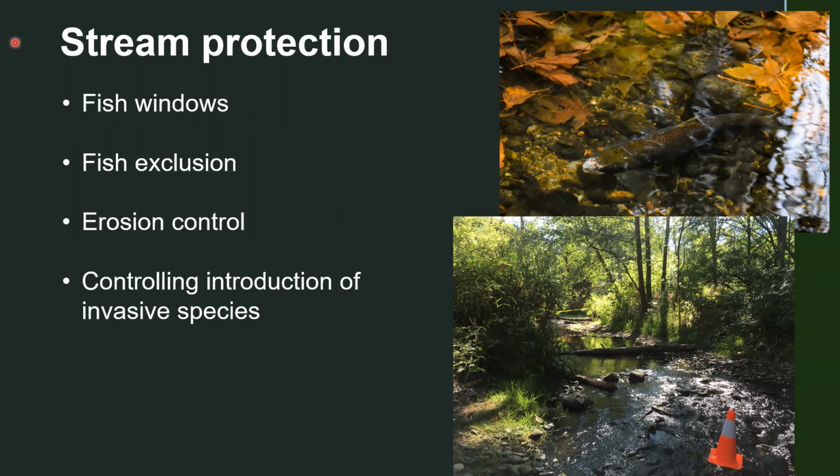The regulatory agencies apply in-water work windows in which folks like King County who need to do a construction project must do any work that touches the water. These windows have been established in times during salmon and other fish reproductive seasonal cycles, where it'll be the least likely to have impacts to the fish in the stream. So this project will be subject to in-water work windows as established by the regulatory agencies.